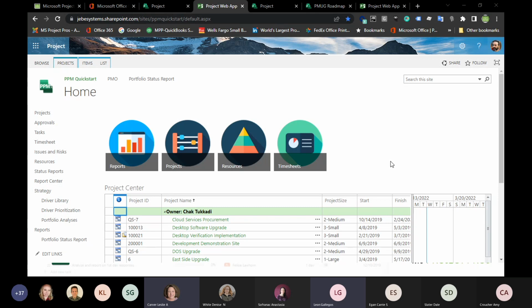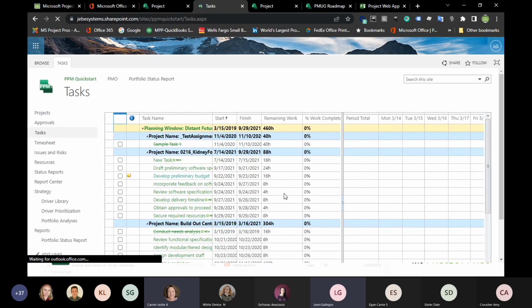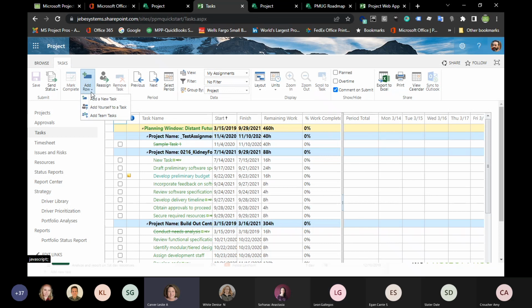But what I can do is see all my tasks, of course, and I can see the project details for any project that I'm on. So that's where this task comes into play. When I come to the tasks area as a team member, there are definitely some things I can do to contribute to the project. When I said the project wouldn't be worked on simultaneously, meaning that the schedule would not have users editing it simultaneously, the team members can still come in here and do things like add a new task, right? But it's based on the approval by the project manager.